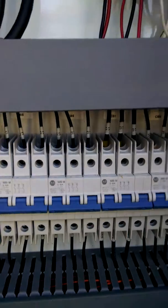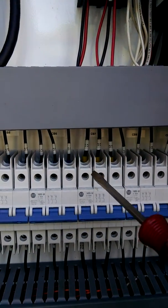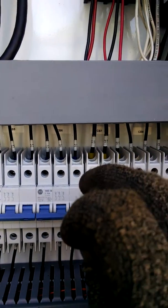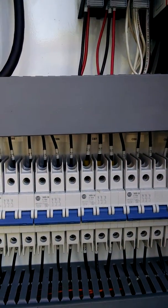After you've checked every wire, you also want to take a screwdriver to the terminal and give it a quick little snug, just to make sure that it hasn't vibrated loose.